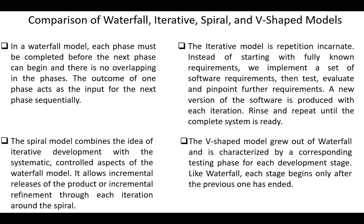The spiral model combines the idea of iterative development with the systematic, controlled aspects of the waterfall model. It follows incremental releases of the product or incremental refinement through each iteration around the spiral. The V-shaped model is similar to the waterfall model, except that testing is performed for each development stage. Like waterfall, each stage begins only after the previous one has ended.